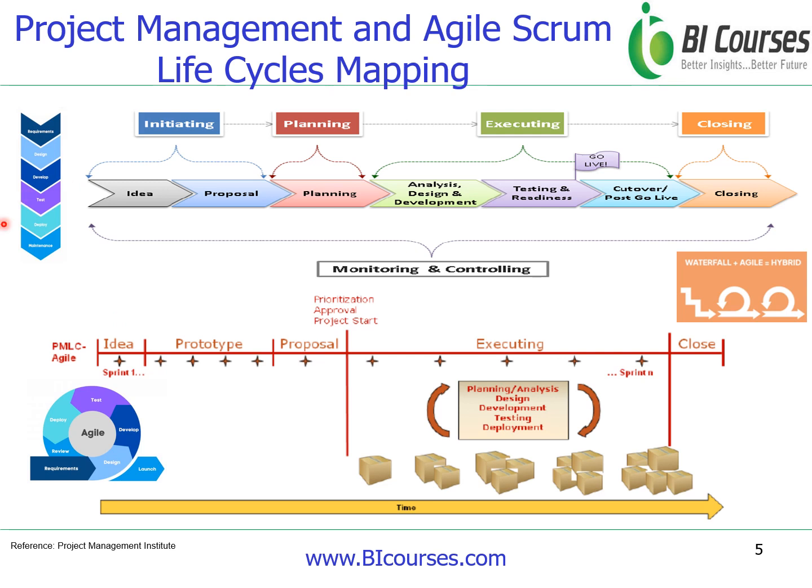So, in the waterfall methodology, most of the life cycle activities occur during the execution phase. Certain activities such as requirements gathering also take place in the planning phase. In contrast, all agile activities from requirements all the way to launch happen only in the execution phase. Hybrid approaches, which are similar to waterfall, leverage both planning and execution phases. However, most of the activities happen in the execution phase.